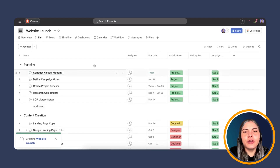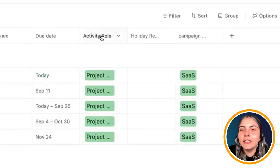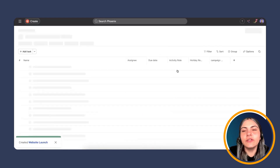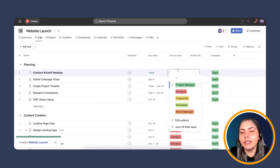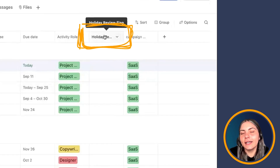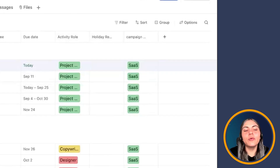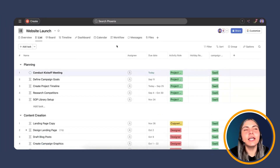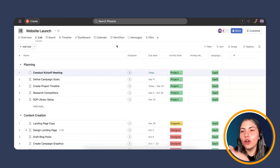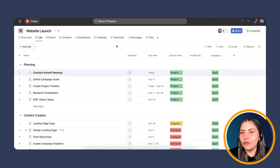I'll show you the custom fields we're going to be using. We have a single-select custom field called Activity Role, which outlines who is in charge of each task — RPM, designer, copywriter, developer, and brand manager. You can have up to 500 option values. Then we have a Holiday Review Flag custom field, also a single-select, which will become the trigger of our rule. Once the project is fully created, the project owner can run the rule across all tasks to check that none fall on a weekend or holiday for that specific team member.